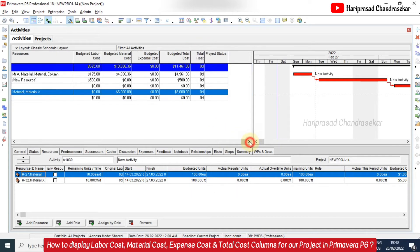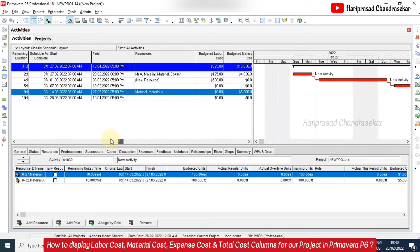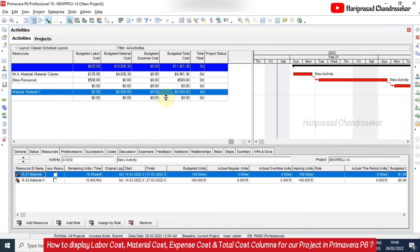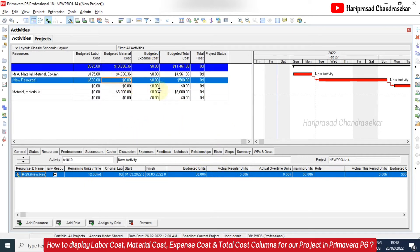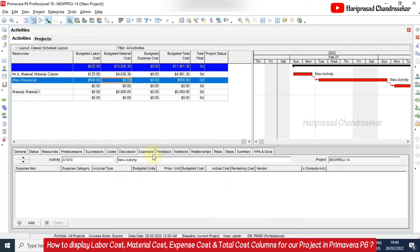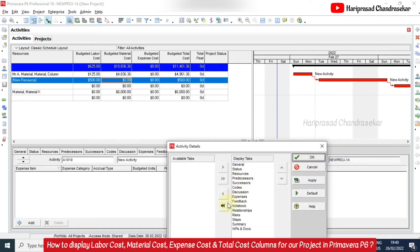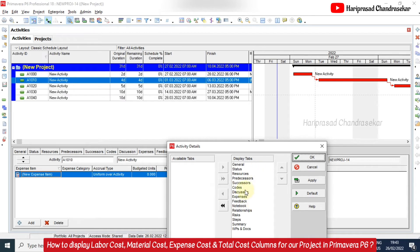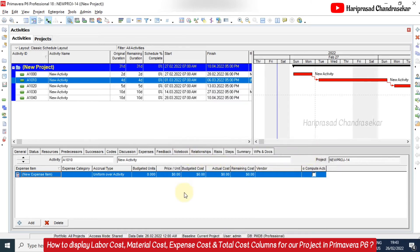And we can use the scroll bars to see all the columns. So now I will try to add expenses, how you can add expenses. So I will select this activity for example. And I will select the expenses here. If you can't find the expense tab, then you can right click here and customize activity detail. Then here you can see everything. So here whatever you want you can take using this arrow and then we can click OK. Then this tab will come.